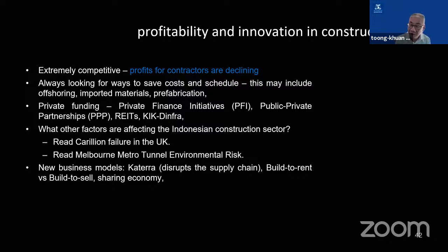Metro tunnel, environmental risk. This is what I've told you earlier. The government put in very stringent rules on the waste material, that it has to be treated. It has to be stabilized before you can dispose of it, but the government did not identify where they can dispose of it, and that caused a huge cost overrun.